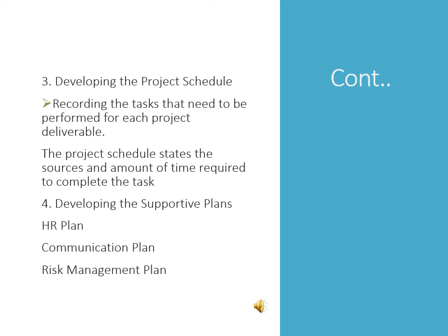followed by developing the project schedule. Here we record the tasks that need to be performed for each project deliverable. The project schedule states the sources and amount of time required to complete the task. And fourthly, developing the supportive plans, which include the human resource plan, communication plan, and risk management plan.